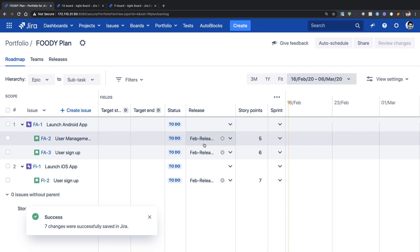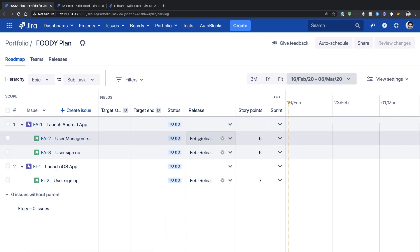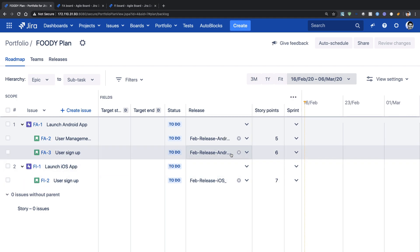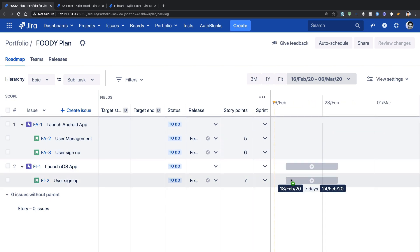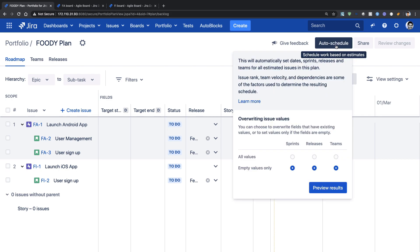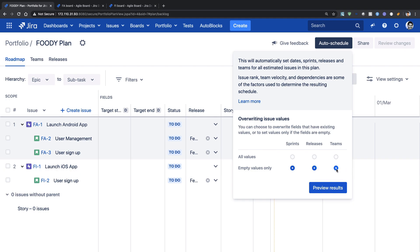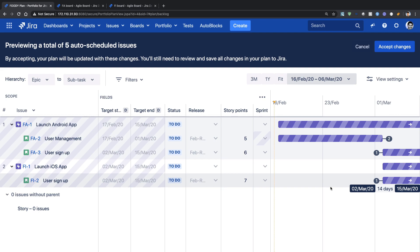Now Portfolio for Jira can actually schedule the work for us. I may want to make sure that I am releasing my user signup feature — which is my story in my Android web release — and same for iOS. But I am not really sure about my schedule, my sprints, or when I can release. What I can do now is click on the 'Auto Schedule' button on top. When you click this button, you are basically letting Portfolio take control of your plan — it can decide sprints, releases, and also do the assignment of teams. If I click on 'Preview Result', Portfolio will suggest a plan for us.